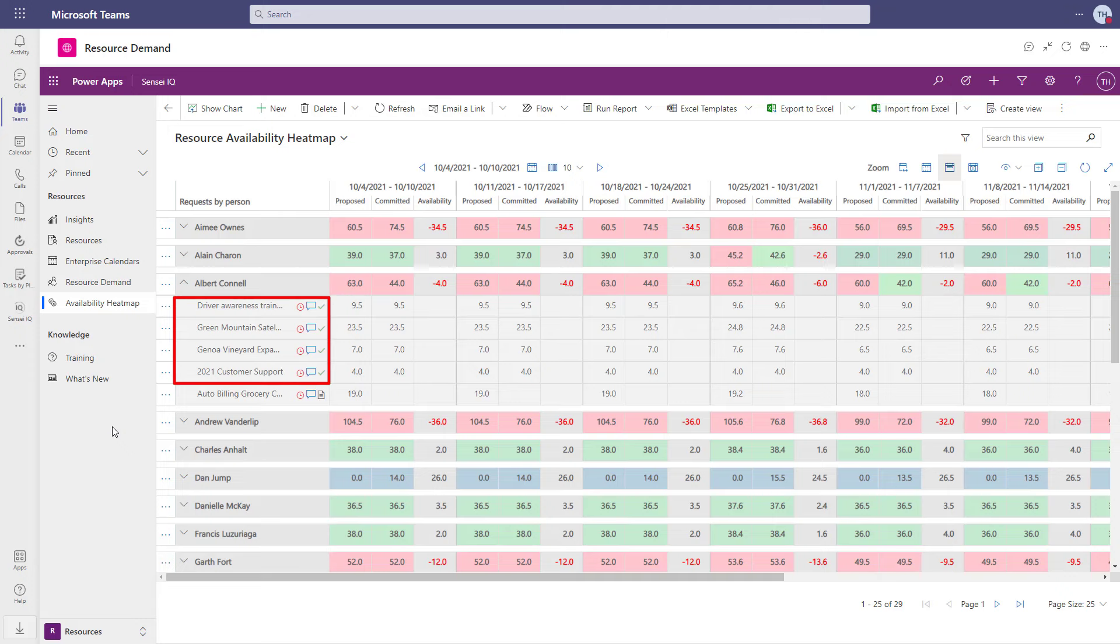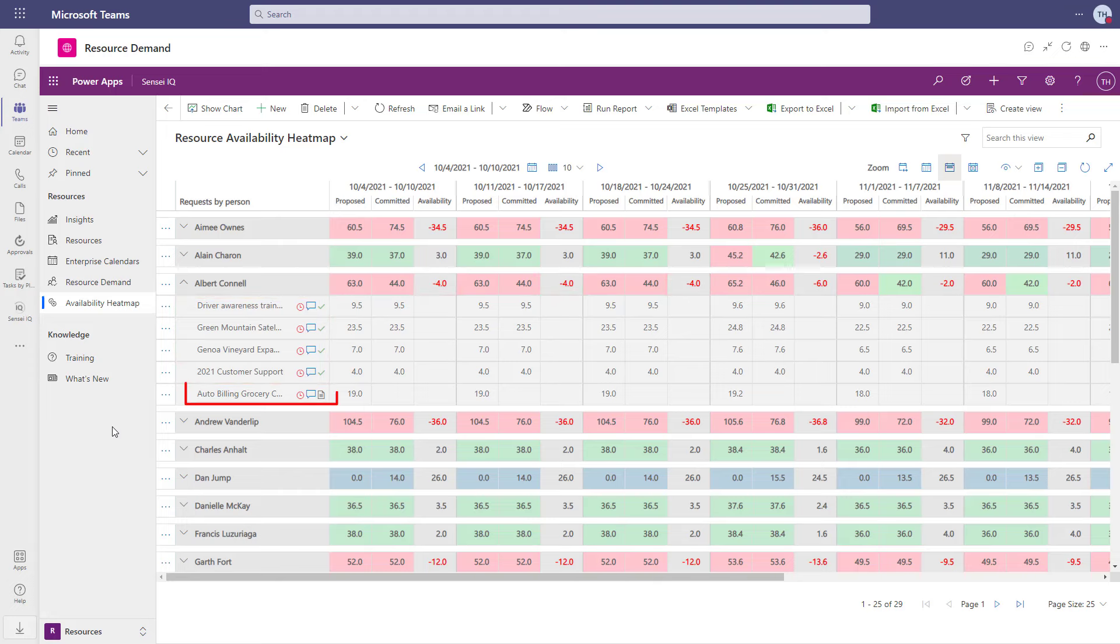In the example here, Albert has been committed to work on four projects, which already has him over-allocated by four hours in the next several weeks. In addition to that, there is a proposed resource request pending approval, which would over-allocate him even more.